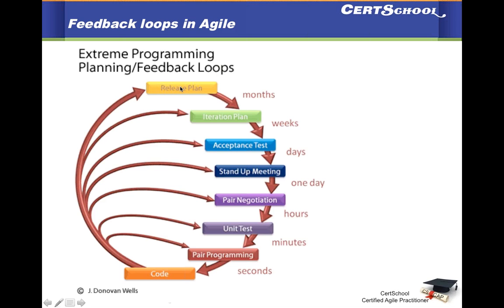A release meaning shipping the deliverables to the customer, as we all know. Then we have the iteration plan. Because you're doing iterative development, you are getting feedback at the end of every iteration. At the end of iteration, if you remember, we do a sprint demo or an iteration demo where we understand what we committed and what we delivered, how well it is working. And we also do retro, which is a very important feedback technique, retro meetings.